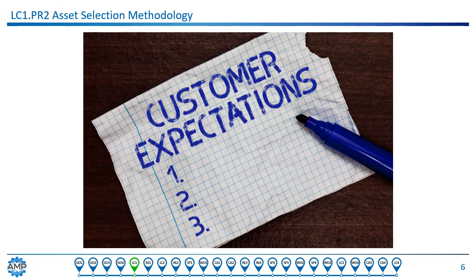Vendor ability to comply with information requirements should be established, ideally as a condition of contract award. Content, format, delivery method, and quality expectations must be clearly communicated and agreed upon. I know I've said that twice now, but this is a vital point. This is where the wheels come off and the project disconnects from asset management and preservation of the lowest total cost of ownership. I hope you're seeing how all this stuff is intertwined.